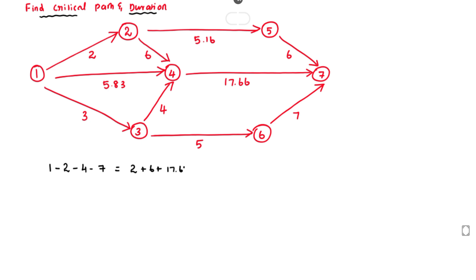The next path is 1→2→5→7. The corresponding duration is 2 plus 5.16 plus 6, giving a total value of 13.16.